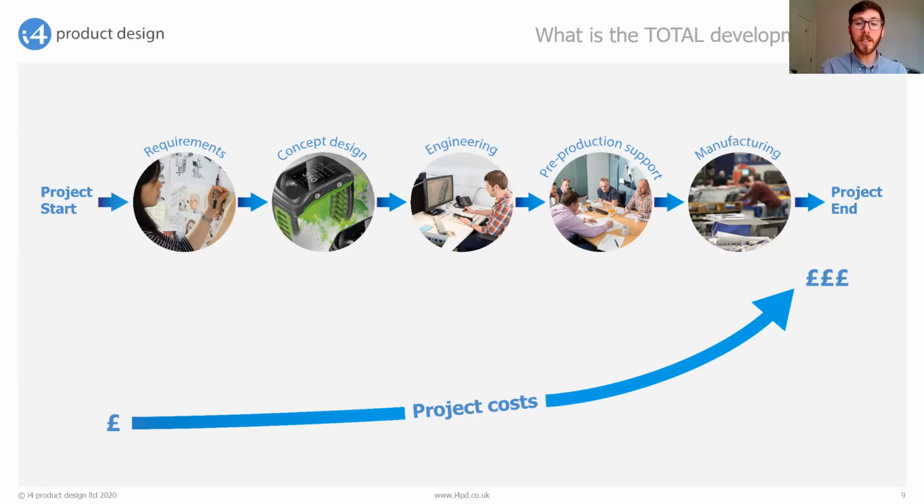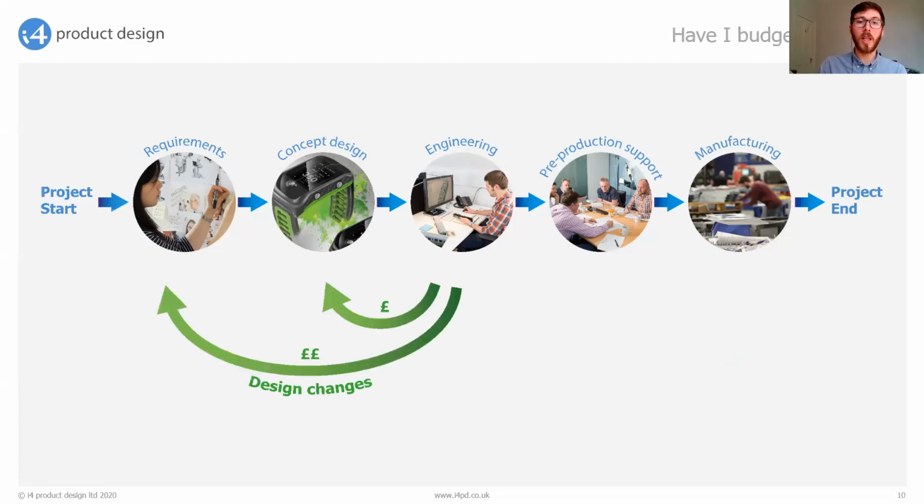It is important to account for these and also import duties when procuring prototypes or tools from overseas vendors, as this can add an unexpected 20% to your costs. If you are working with a design partner or manufacturer, make sure you're getting a quote that covers you right from where you are in your journey through to production samples.